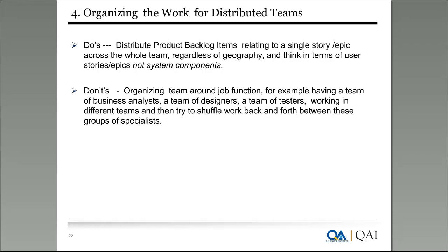The best is to distribute a set of epics across a set of stories, or an epic across the whole team, so that the whole team is cross functional. When I say cross functional, it should contain all the team members within that location, having the business analyst or a proxy product owner, developers, and testers together. And the work needs to be organized in such a way that the team will be able to deliver a good business value product increment.